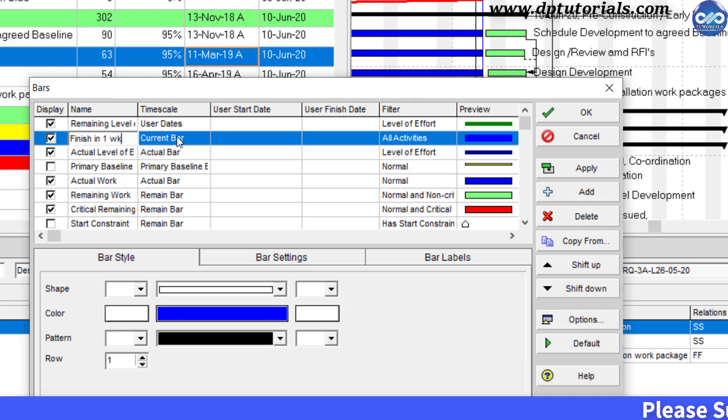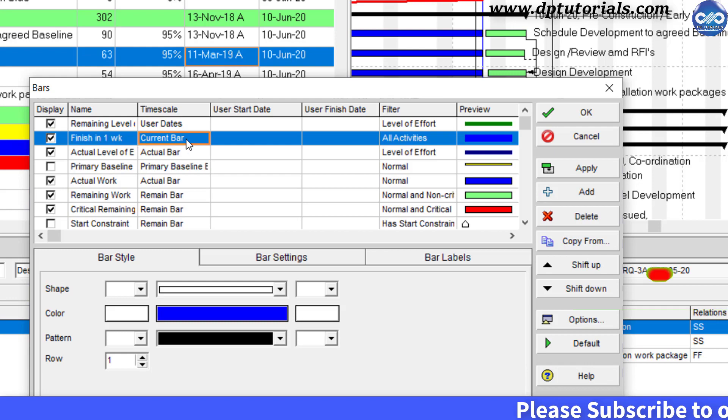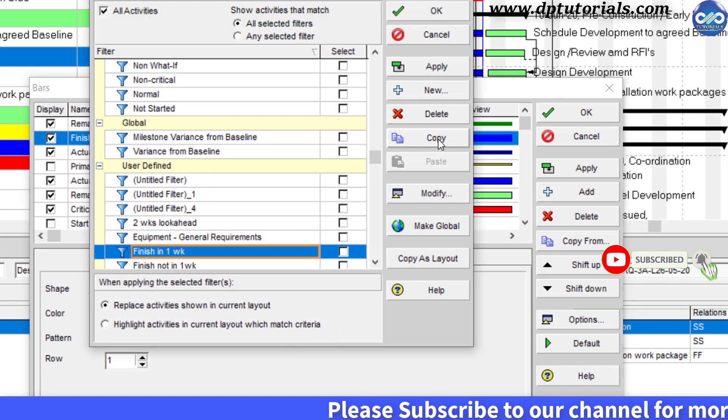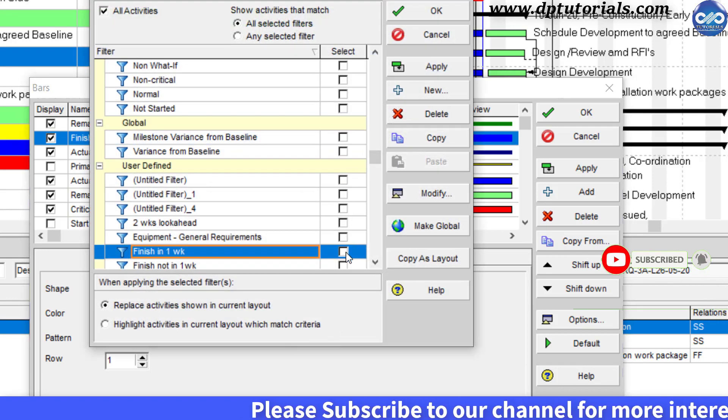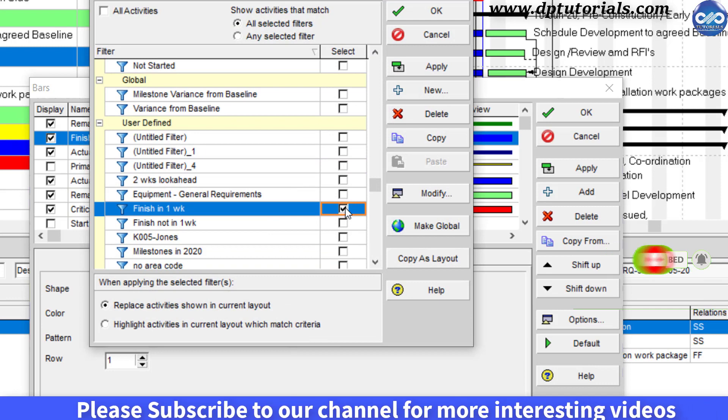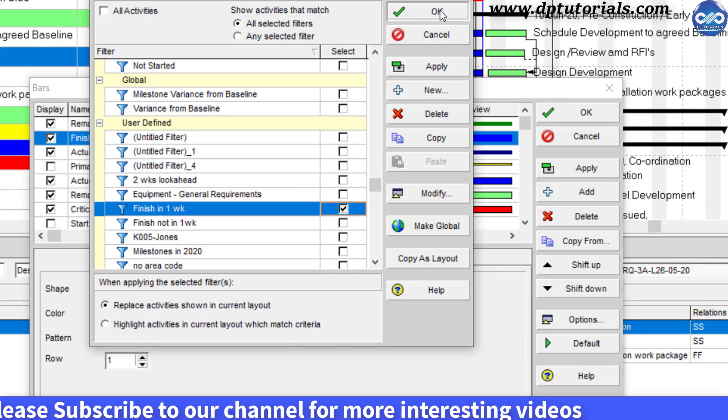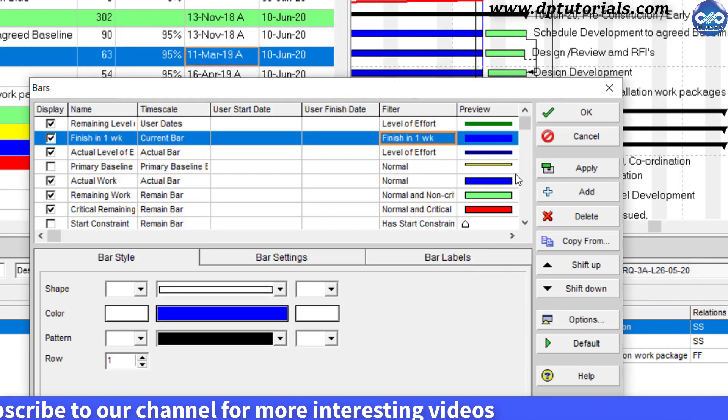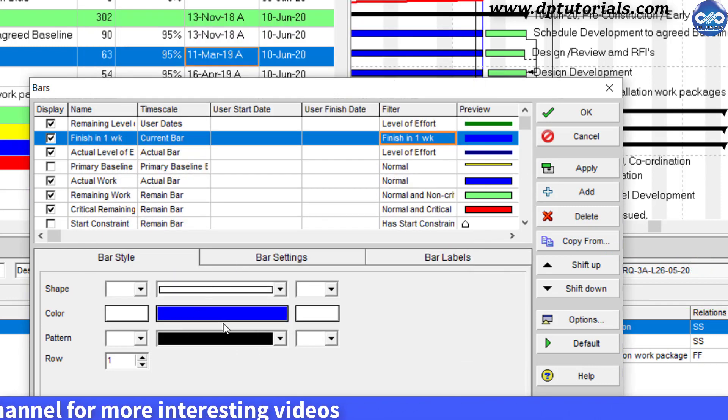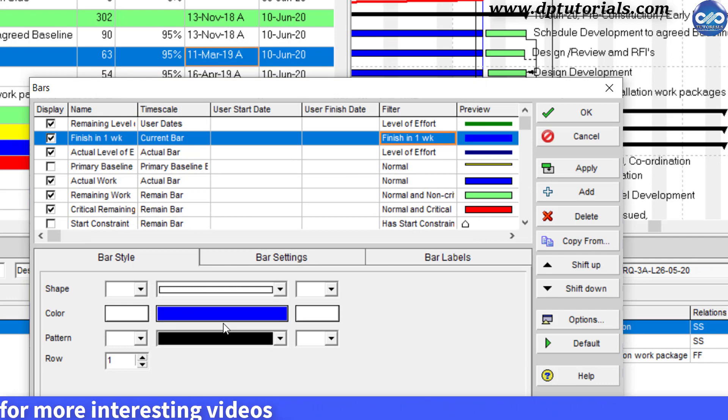Select time scale as current bar. Under filter, select our finish in one week filter. And select the bar color. Now go to the bottom section and select the bar color as orange.